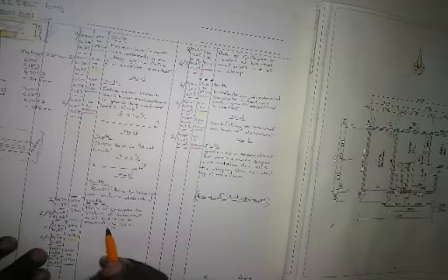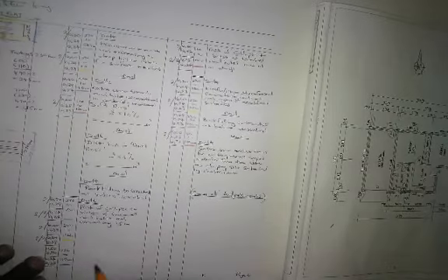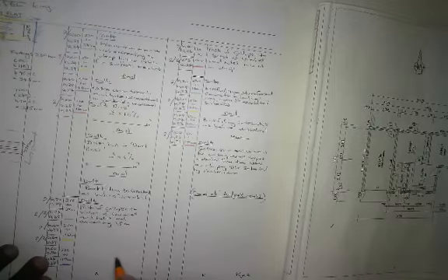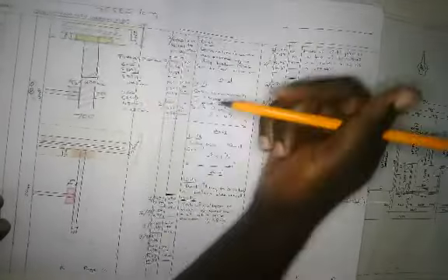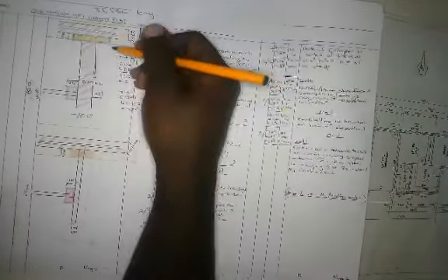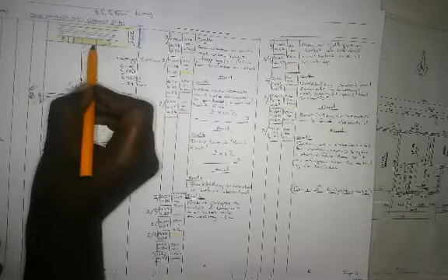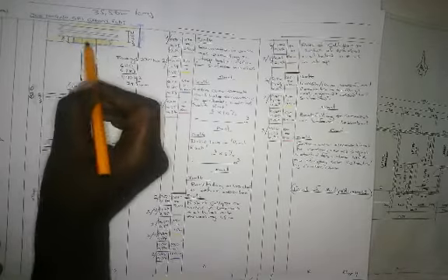And then that adjustment is also going to include excavations, soft rock, hard rock. And then you're going to set and deduct backfilling to trenches as before, and then you're still going to need to deduct the risk of collapse to that part.